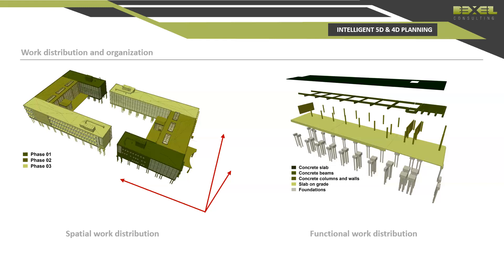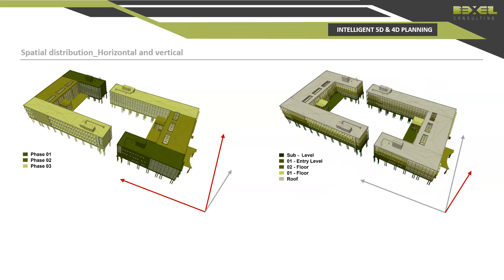When thinking about improving this process, we were certain we had to develop really detailed schedules with a huge number of tasks and complex relationships, but we needed to cut the time and resources required. So we started by analyzing the schedule structure. We found that any standard construction schedule consists of two major levels of organization: work distribution within the schedule is basically spatial work distribution — defining where works are executed — and functional or methodological work distribution — defining the order of activities.